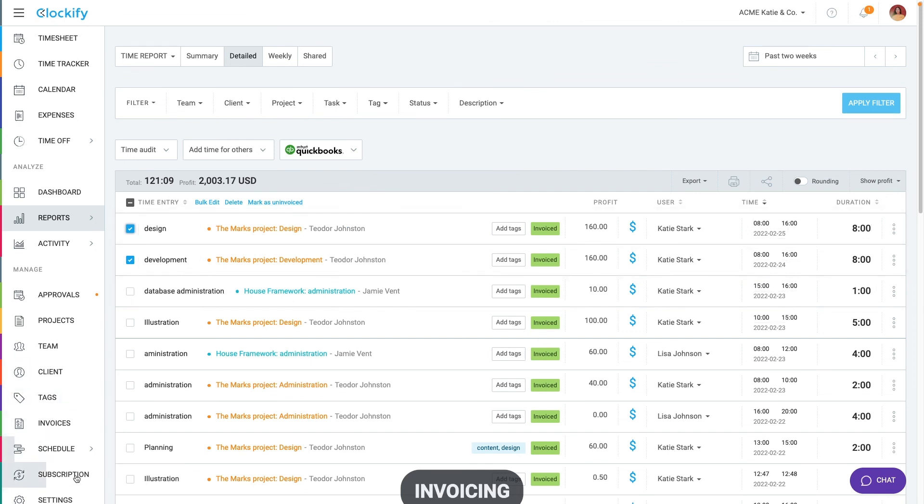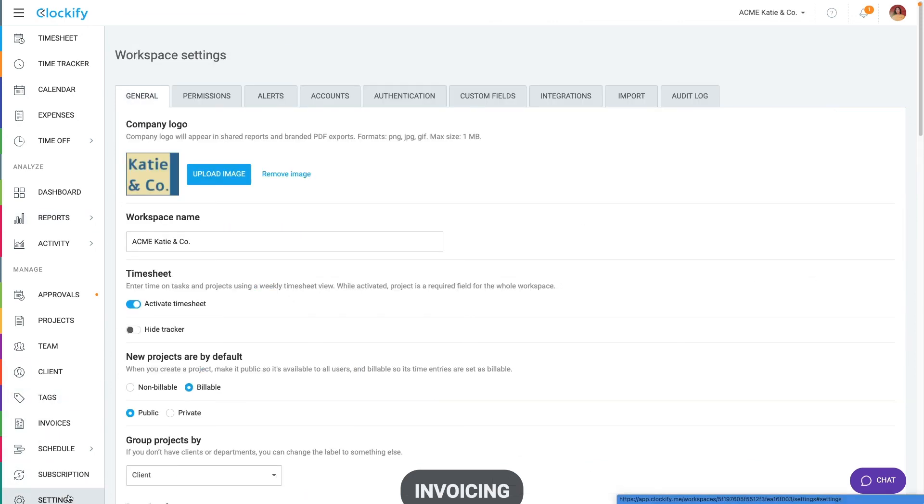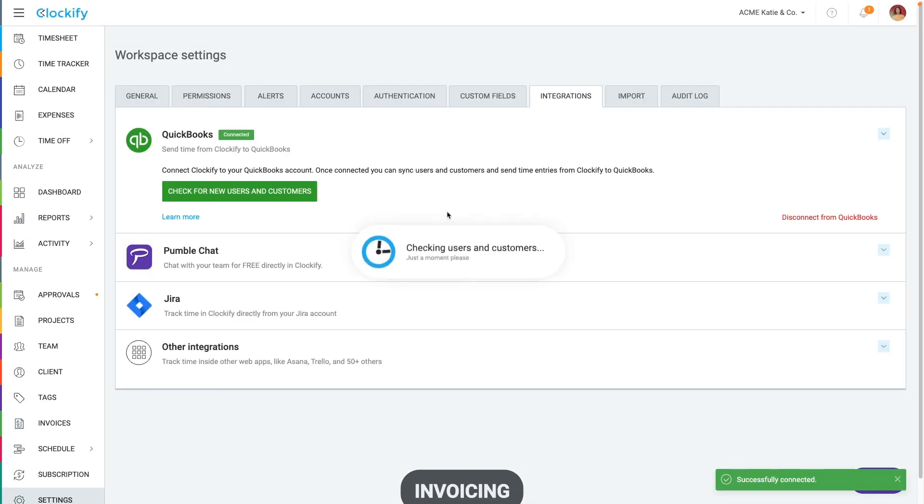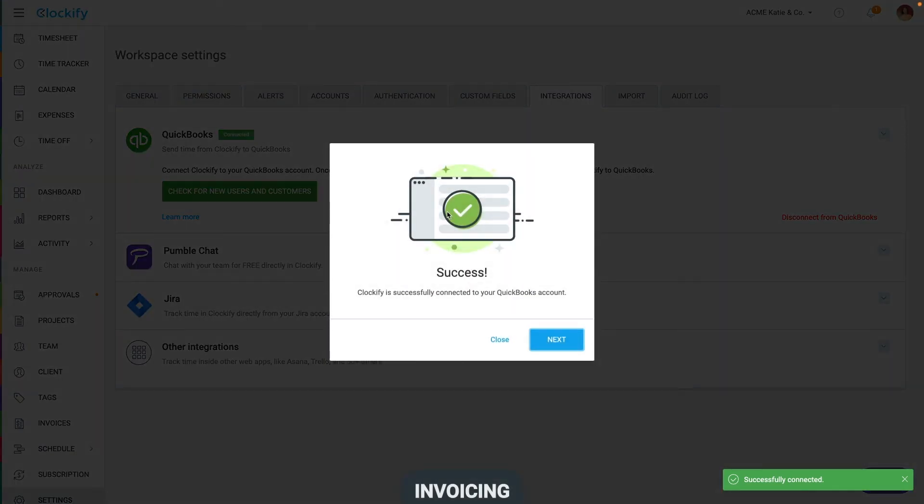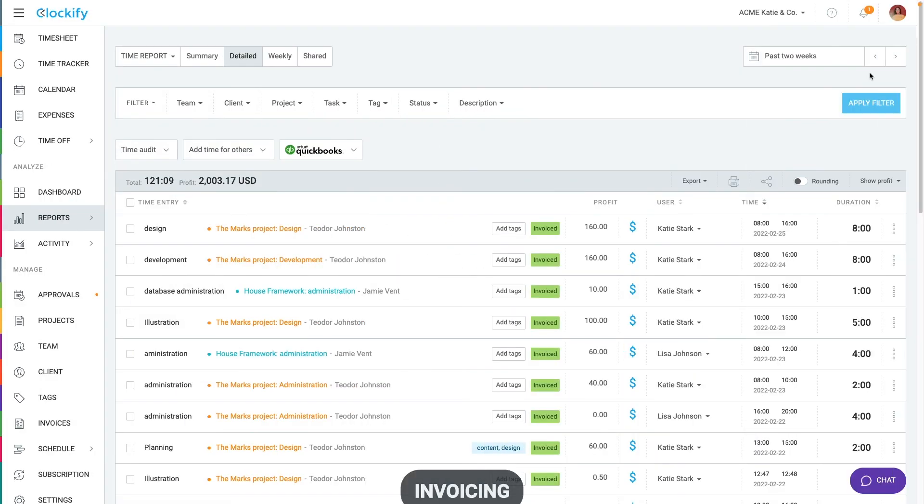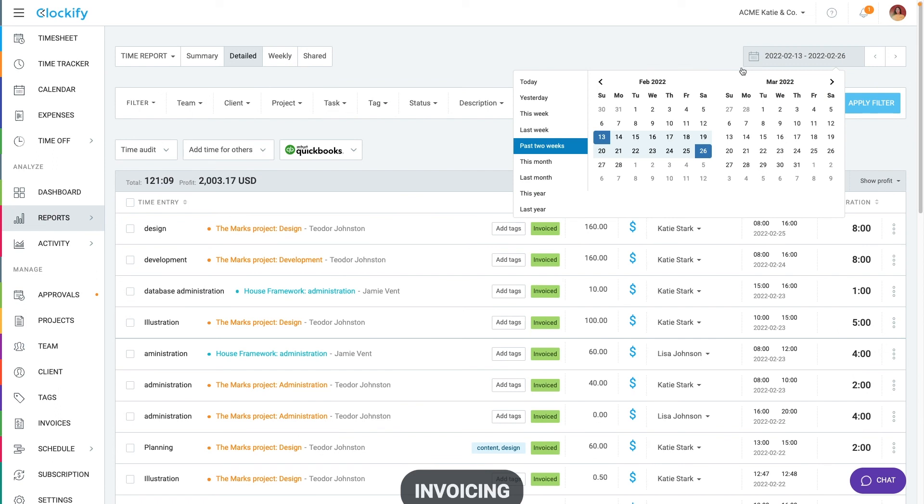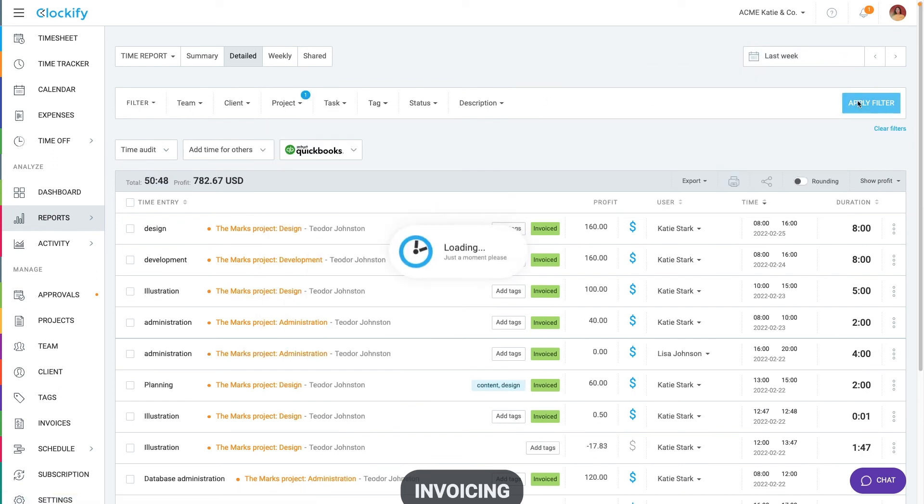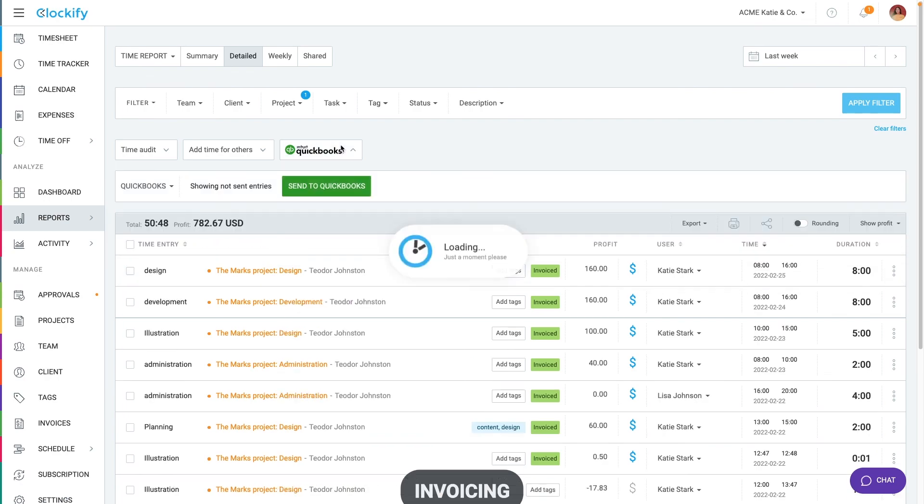If you're using QuickBooks for invoicing, you can connect it with Clockify in the integrations tab. Once you're connected, you can go to detailed report, choose date range and filter by some dimension and then send everything you see to QuickBooks and create invoices based on time there.